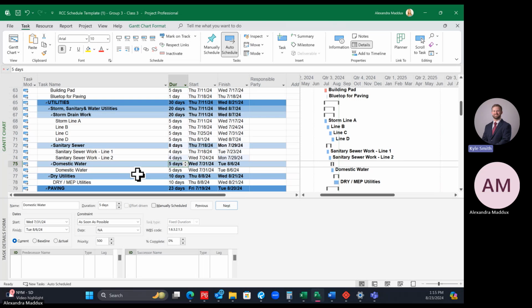If there's a chance that line 2 could go earlier and you may flip the order, that's where you may want to keep it. But if sanitary sewer line 2 doesn't even have to be after storm line A, then you could get rid of it. So you could remove the redundancy. The risk would be if you do decide to flip the order and go in a different order. Does that answer your question? Yes. Okay. All right. Any other questions with this breakout that we did?